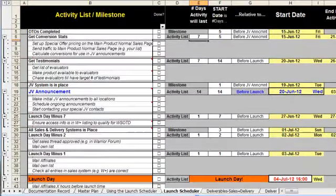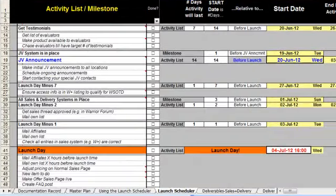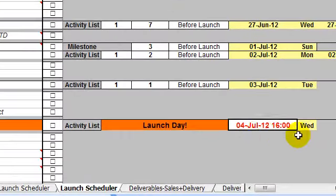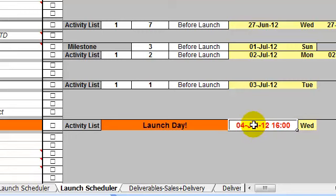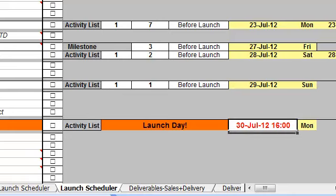What drives the whole worksheet is the launch date, and in fact this is the only date that you can change directly. When you do, all the other dates change automatically. For example, if I were to change that to the 30th of July, you can see all the other related dates are now automatically being updated.